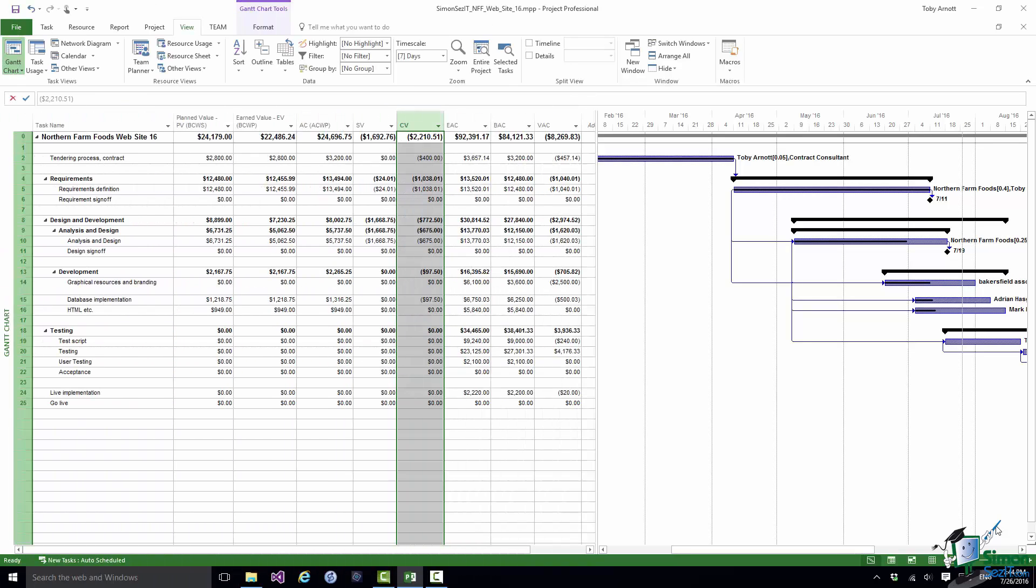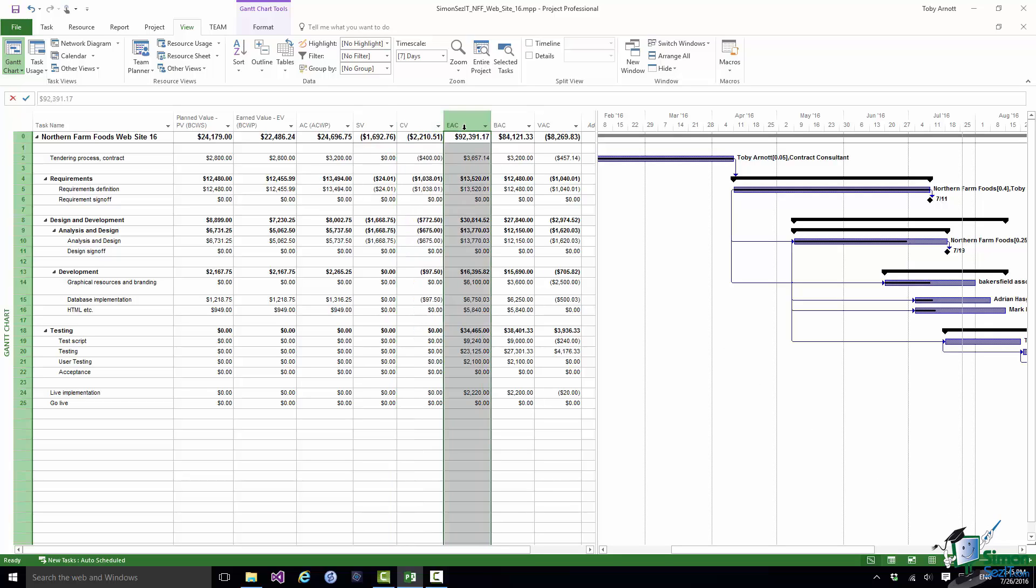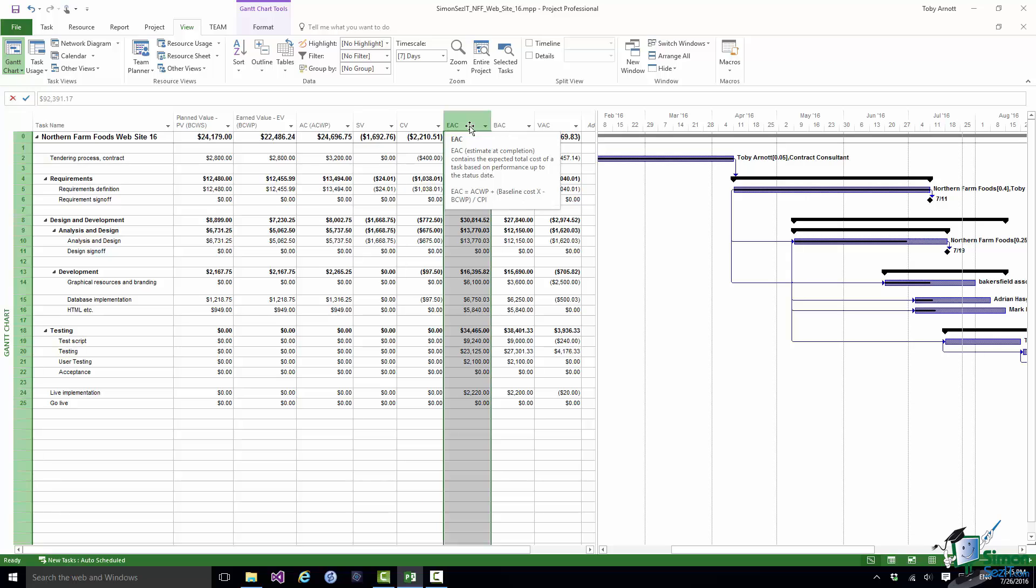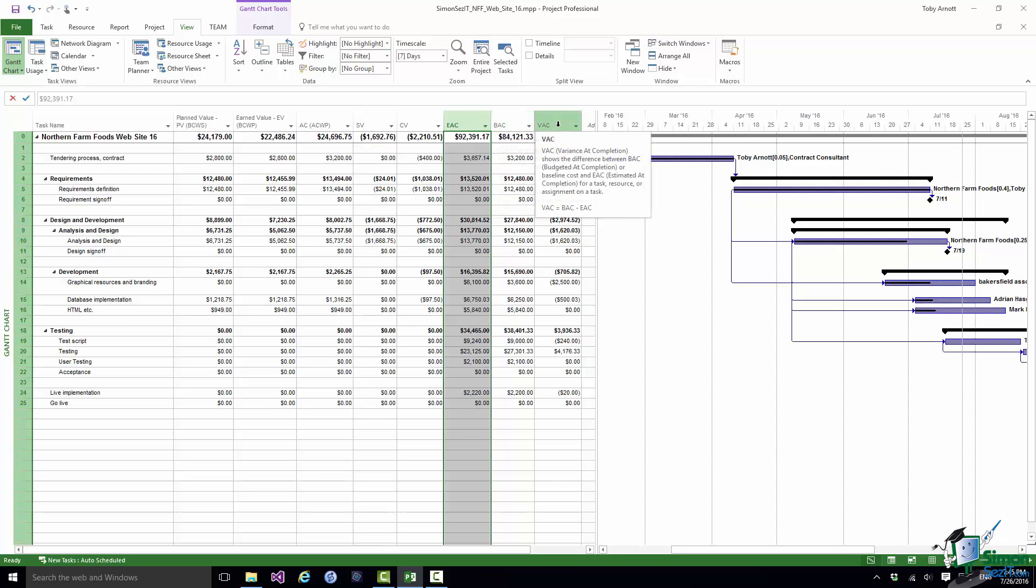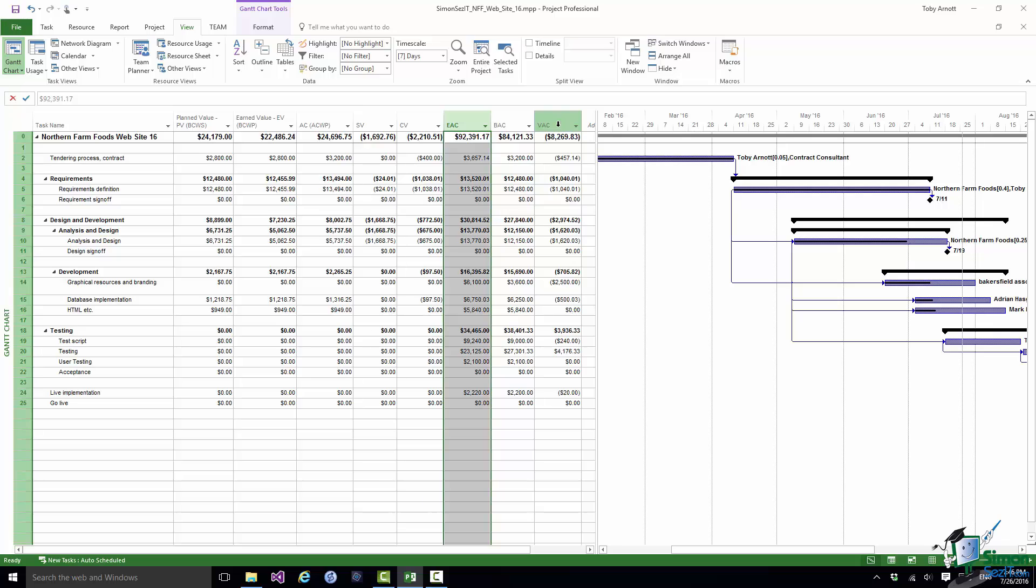Now the final three columns here all anticipate what will happen at the end of the project. So we have EAC which is Estimate at Completion. There is a formula there that shows you how EAC is calculated and it is the expected total cost of a task based on performance up to the status date. Now one of the values in that formula is CPI and I'm going to talk to you about CPI in just a moment. So that's the EAC. The BAC is the baseline cost. So that's the cost as in our saved baseline. And finally the VAC column is simply BAC minus EAC. So again if everything was zero everything would be perfect. Positive is good news, negative is generally bad news. And it's mostly negative in this project at the moment.